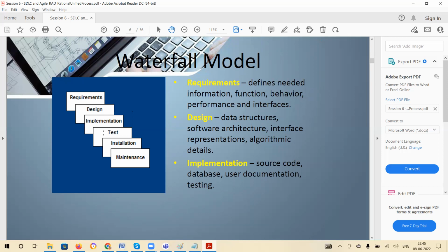So once you are done with project initiation and get to the requirement phase, you cannot go back to project initiation. Once you're done with requirements and go to design, you can't go back to analysis again. If you're done with that, you go to the technical or development stage. You can't go back and change the design.